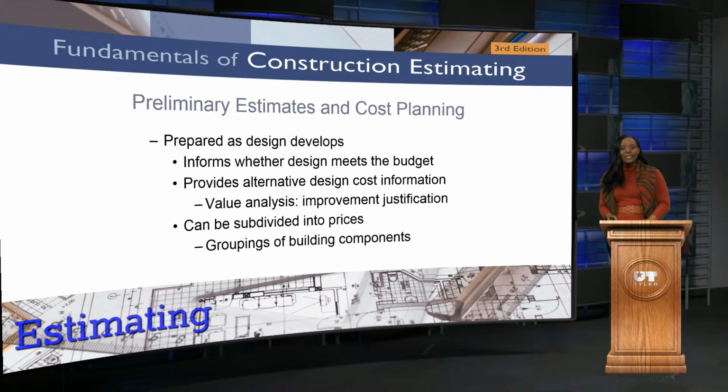Going forward, just a little bit about preliminary estimating. It's really prepared in that design development stage, or what people call the DD stage. Here, you're going to find where you're working more with forming a floor plan, elevations, and maybe even a few little details. That information is then forwarded on, but for the most part, this does give you a chance to come up with a preliminary estimate. We have a little bit more detail. It's not so vague anymore.